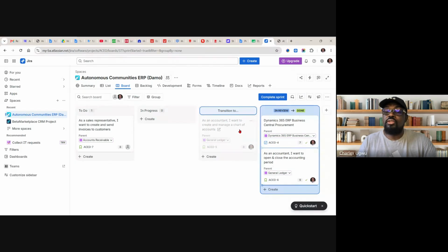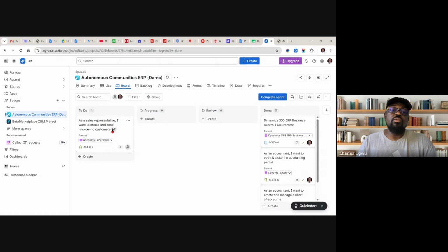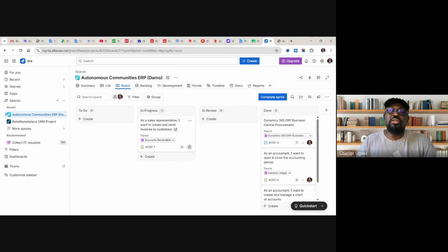And we'll put it down here as well. Remaining one work remaining. And we'll put it here. If we have this one work remaining and the time is over, for instance, it is 2 weeks already, and we have this one work remaining, we can't finish this, we can't start this account receivable. What do you do? You have to put it back to backlog.